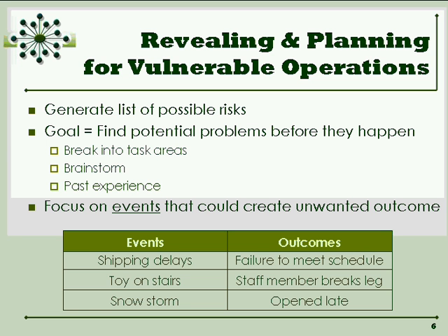There are many common events that we all deal with on a regular basis that have impact on the outcome of the study, such as transportation problems, childcare difficulties, illnesses, even when participants can't come in or staff can't come in due to the flu, a cold, incarceration. So there are many different events that we already work with that can be planned for ahead of time and hopefully reduce the impact, because these events could result in an outcome such as missed appointments, missed study windows, missing data, and even possibly affect the outcome of the study.